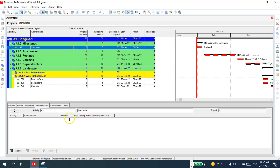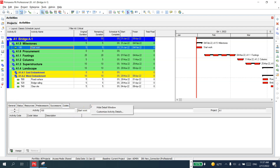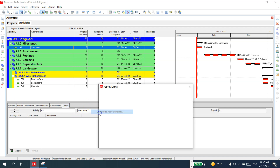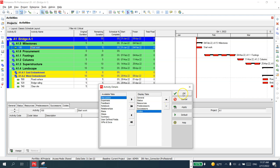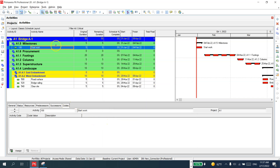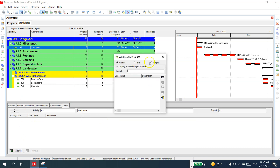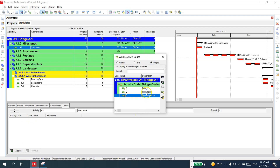Now I'd like to assign these codes to the activities. In the bottom Activity Details panel, you have a 'Codes' tab. If it is hidden, right-click, choose Customize, and on the left side find it highlighted, then move it over using the arrow. Now I'd like to assign, for example, 'Start Work' — I'll add it here into the project for Foundations.